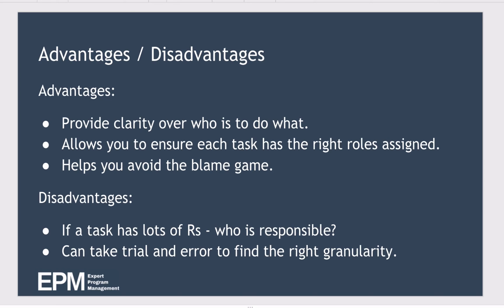What are the advantages and disadvantages of a RACI matrix? In terms of advantages: they provide clarity over who is to do what; they allow you to ensure each task has the right roles assigned; and they help you avoid the blame game, since everyone's responsibility is clear from the outset, making it very hard to shift blame once the document has been distributed to all stakeholders. A disadvantage is that if a task has lots of R's, it's unclear who is ultimately responsible for making sure all those people pull together to get the task done.